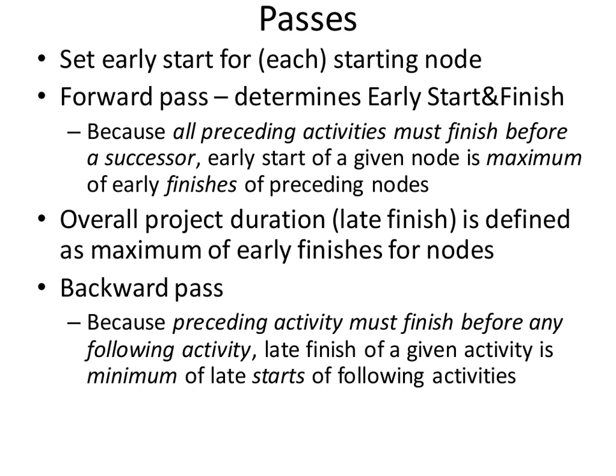If there's something that depends on you that has to finish by a given time, a quite early time, you have to finish prior to that. So, if there's something that depends on you that has to start by a certain early time, you have to finish at least by that time.